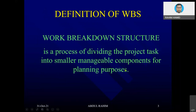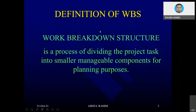WBS is a process of dividing the project into smaller manageable components for planning purposes. We divide into smaller portions because we want to attach some kind of quantity. Once we know the quantity related to a portion of work, it is very easy to measure progress and performance. Otherwise it is very difficult — if you cannot measure something, you cannot manage it. Everything basically needs some kind of measurement.